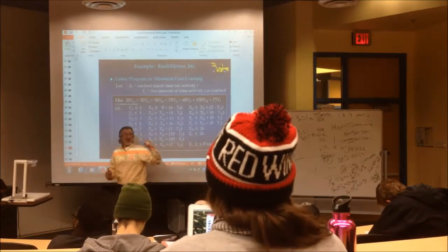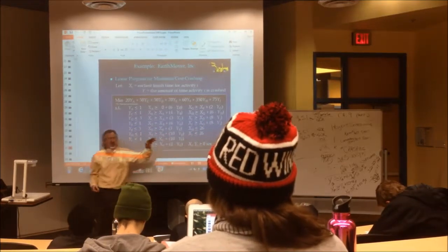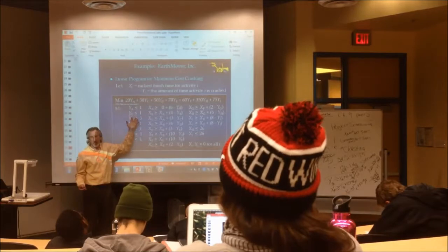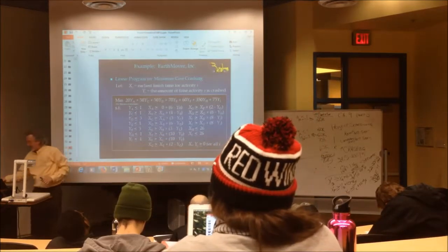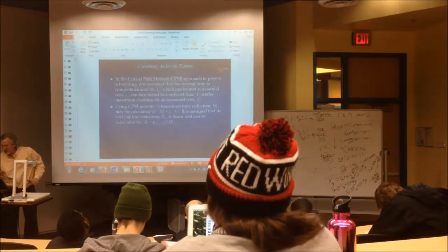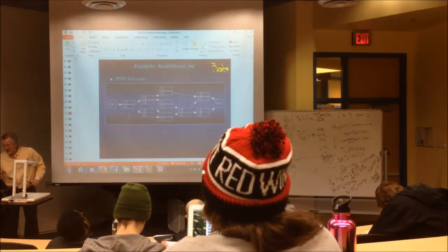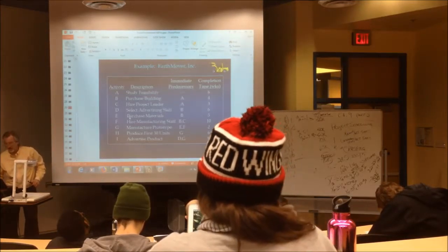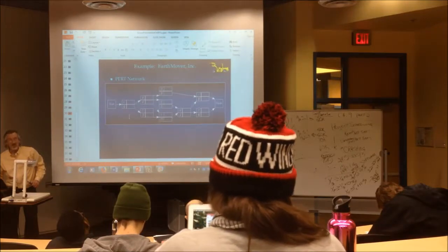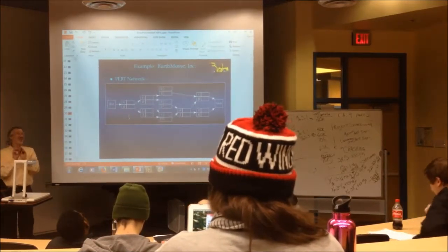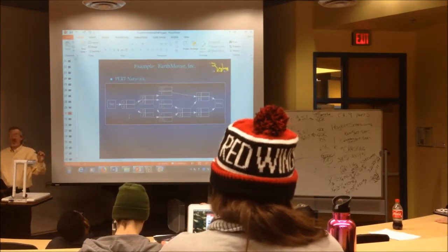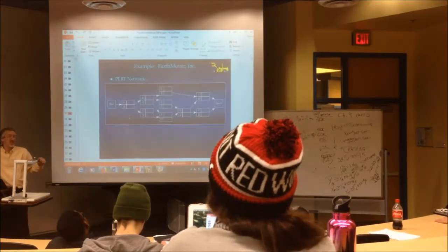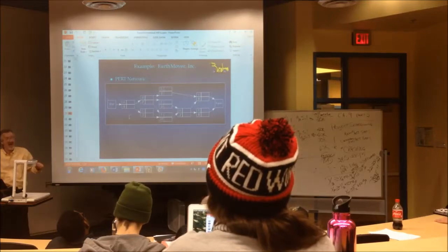All right. So now you go, oh, I've got my objective function. I've got my Y constraints, crashing constraints. I've got my activity constraints. But then you've got to look at this. Either this, again, either that or that. And you've got to say which activities do not precede any other activities that go directly to the finish. And in this case, we have I and H.